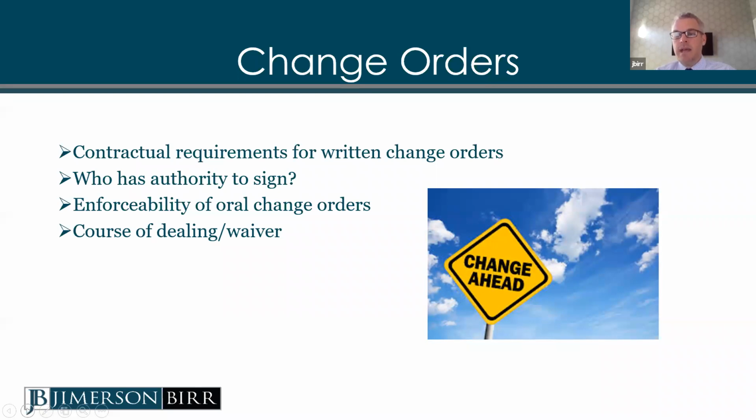Even if you can't get someone to sign the change order, or they've authorized you to do the work but for some reason they just can't sign the document, at least follow it up with an email memorializing the directive. That's better than nothing, better than simply going ahead and going forward with the work without anything more, and then hoping at the end of the day you get paid without a written signed change order.